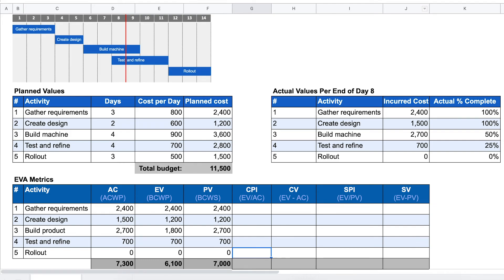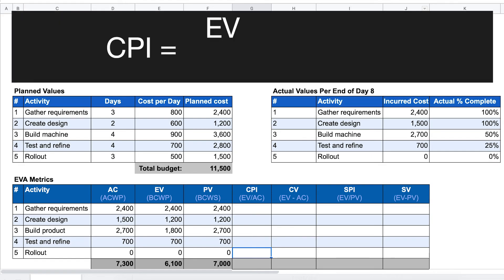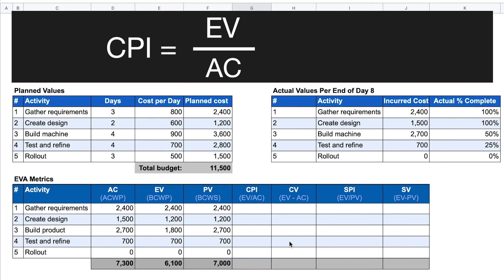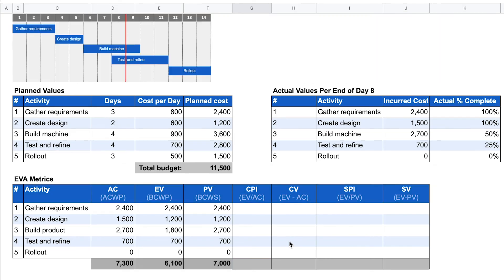Now we calculate the CPI, or cost performance index. The CPI gives us an idea of how far above or under budget the project is in terms of the overall total approved budget. We calculate CPI by dividing the earned value by the actual cost. For our example: earned value of $6,100 divided by actual cost of $7,300 gives us a CPI of 0.84. This number is less than one, which means we are over budget — we are spending more money than we should be.